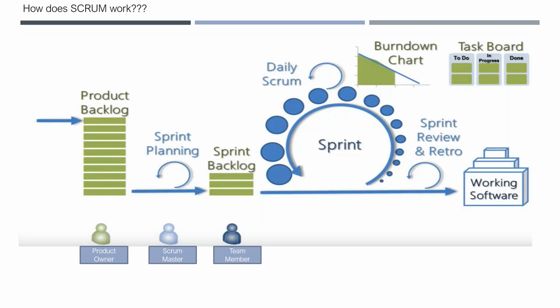The bottom line here is that you will develop the features and give them for testing in phases. That phase is called a sprint. Another name for sprint is iteration. If you see in our work item template, you call it an iteration in that drop down. Now, in order to give those requirements to the team members for development or test cases, etc., you need to plan it. That is called sprint planning, and this process will continue for each and every iteration.